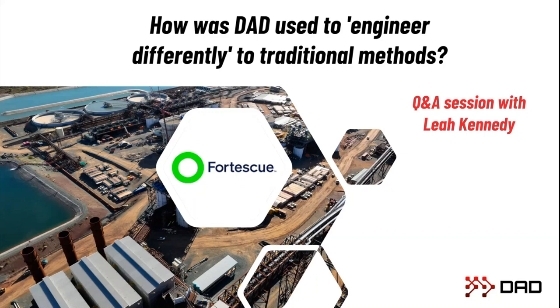And also, just as a side note, when it was given to the constructors, the construction contractors, they were given frozen snapshots. So that had been controlled and reviewed, they were given this frozen snapshot and were able to see all the revisions and changes in DAD themselves. We also produced a weekly spreadsheet of all the changes, because this was a fast-track project. Design and construct were happening simultaneously.